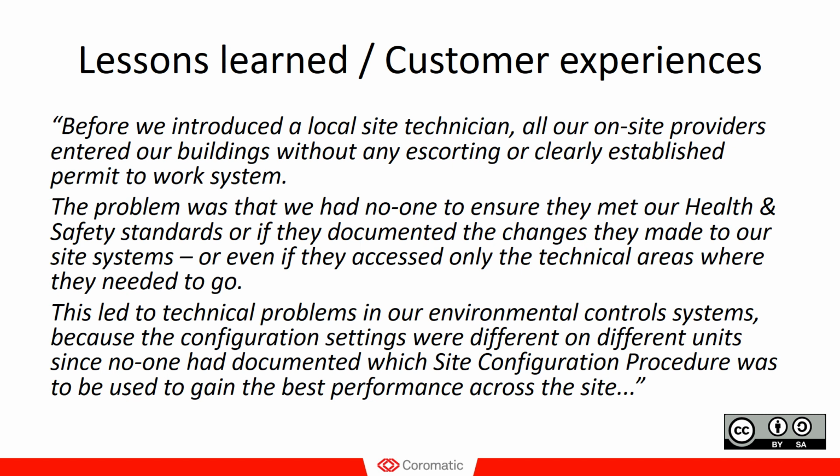So the conclusion of this, apart from posing severe risks, not only to health and safety but also to the site security, since they could move around in the different areas, it also led to technical problems in the environmental control systems, because the settings on the cooling units were configured differently between the different units, because they had no clearly documented site configuration procedure which stated how they should be configured to gain the best performance across the site.